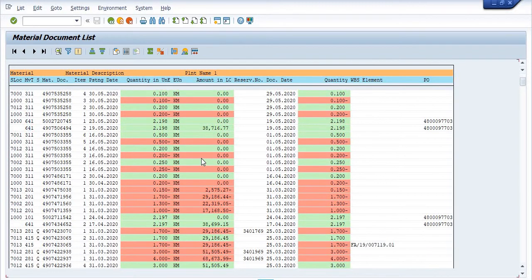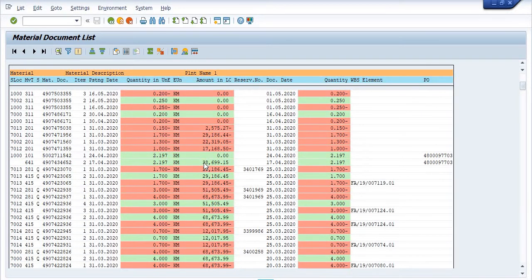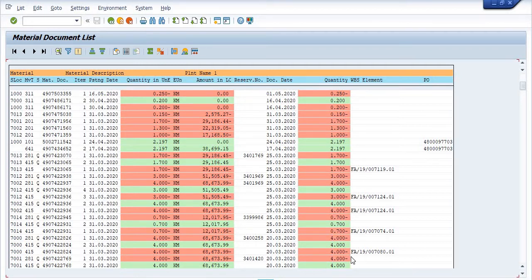Once you utilize this UZ cable in your project in the WBS against a reservation number, 4 kilometers of stock will be reserved in WBS FA-190080 against reservation number 3401420. You can also view this reservation number against this WBS using transaction code ZPS_MPR.